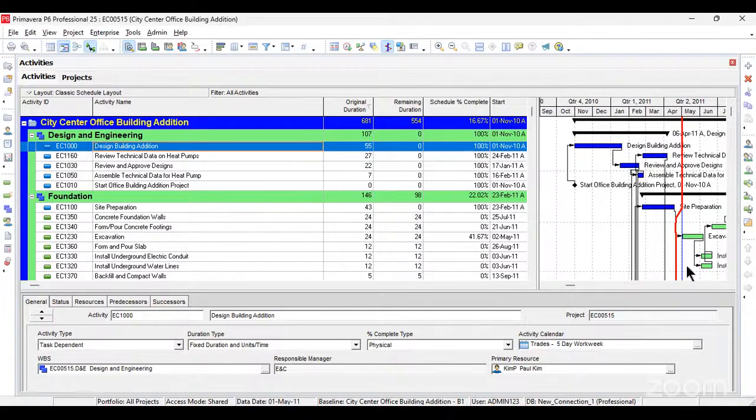So if it's procurement and that heat pump is supposed to be on site on Monday, please do every possible thing to make sure it's there by Friday, Saturday or Sunday, not Monday itself, or even a week before, 2 weeks before. So with this, maybe we can delegate some tasks to some other person. Make sure you follow up on this and it is available maybe 1 week before it is even needed. It's on ground.